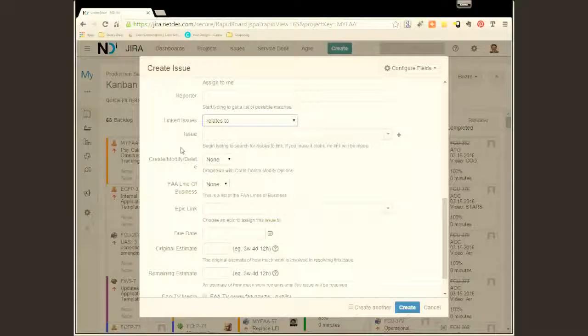So first ticket finishes before the second ticket finishes is this one, okay? So the first ticket finishing depends on the second ticket finishing. In this one, first ticket finishes, second ticket starts. So the first ticket depends on the second ticket starting. It's all written in the knowledge base, and I'll show you how to use all that because even I have to go back through those once in a while. They get a little confusing.